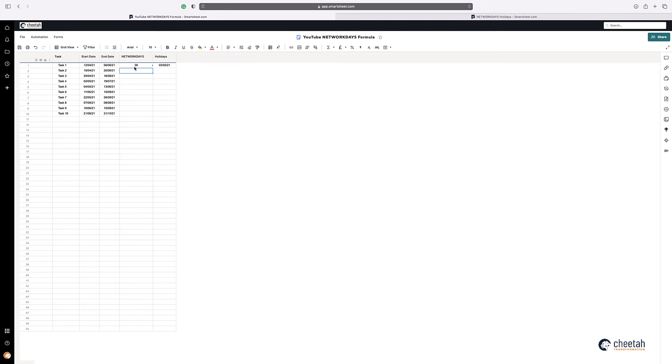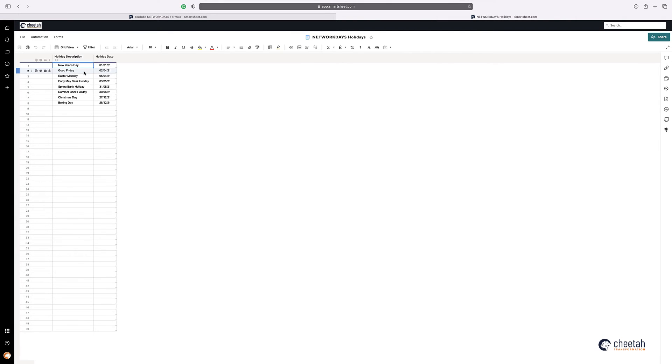You can see that it's gone to 38 days, and that's because during that range, there are two holidays that we have here in the UK.